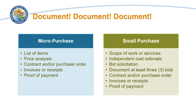Documenting decisions at each stage of procurement is incredibly important to demonstrate compliance with the requirements. For micropurchases, documentation should include a list of items, price analysis, contract and/or purchase order, and invoices or receipts and proof of payment. For small purchases, documentation should include scope of work or services, independent cost estimate, bid solicitation, documentation of at least three bids, contract and/or purchase order, and invoices or receipts and proof of payment.